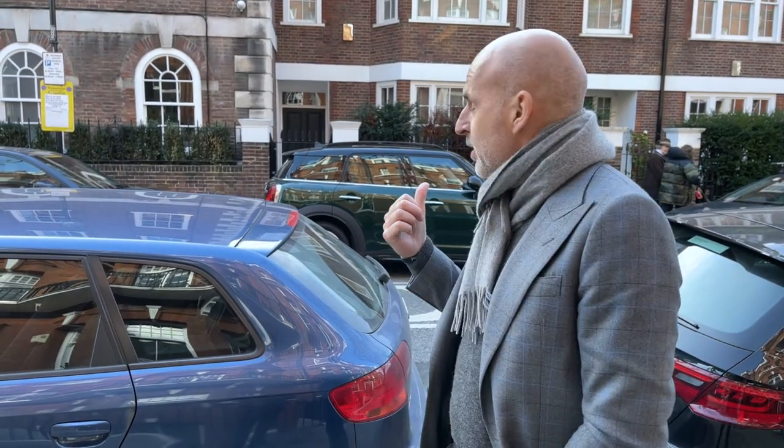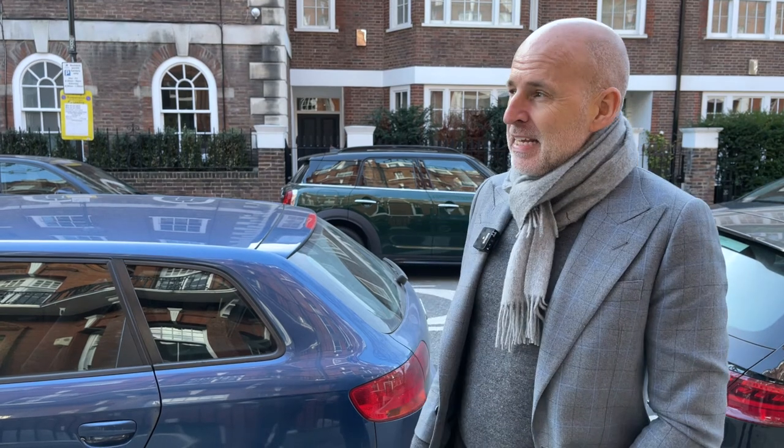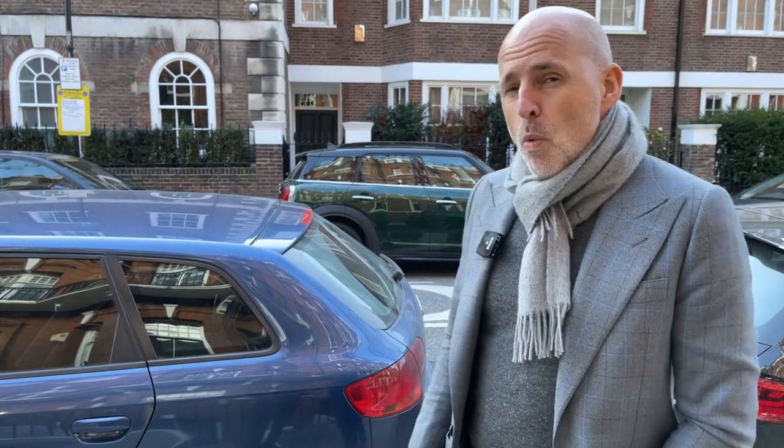So this one behind us, 22 Tite Street. Again, we did this one maybe 5 years ago. It was completely unmodernised. We got planning for a basement under the footprint, and that basement was 1,500 square feet. We also did a full refurb to a very high specification. The build cost here in the end was almost £2.5 million, and I think it sold for 9 million in the end. So 9 million quid. What could you buy for 9 million pounds where you lived? Crazy.